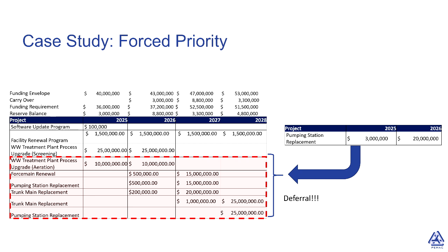So at least what we're able to do with our risk-based model is that we can fund the most important ones at the top, get the most value for money, and then look at what's pushed out. We look at every one of them, and we can look at this risk mitigation exercise. And what we generally find is for a lot of those projects, we're able to make do. We're able to prolong life through doing more maintenance. We're able to do bypassing if that would come up. We can do spot repairs.